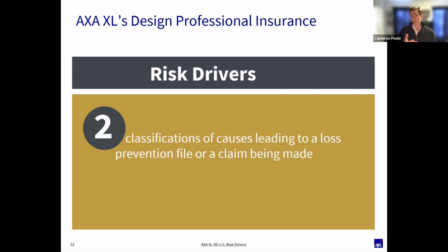So what you can do is open a loss prevention file, and the insurance company behind the scenes will have an attorney help you write an email that essentially says to the client, you can move forward with the change in the windows that you've requested, but if you do so, you release us from any and all liability stemming from making that change. So it's really useful. You can guess, oftentimes we send that email to the client, and the client all of a sudden no longer wants to make that change because they realize that maybe that wasn't such a good idea. But that's the difference between a loss prevention file and a claim. It's really a precursor to a claim, and it's just a service that the insurance carriers provide.